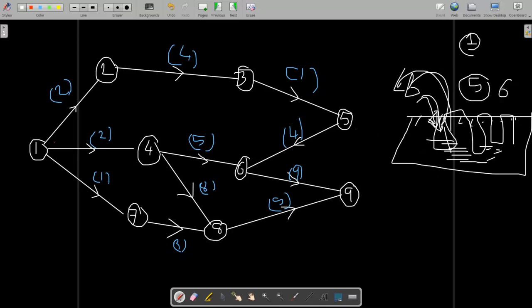Now from the 6th day you can start making the foundation, with RCC and cementing also. After drying, it will take, for example, 10 days, and after the 16th day you can start other activities.